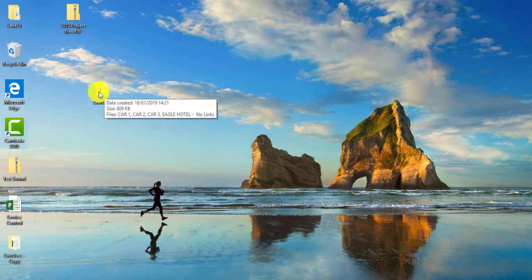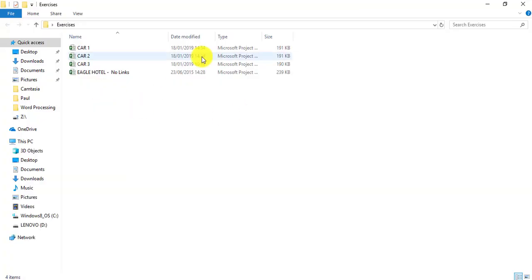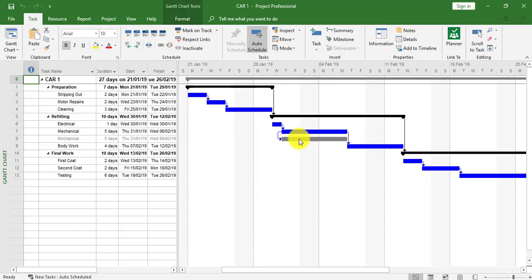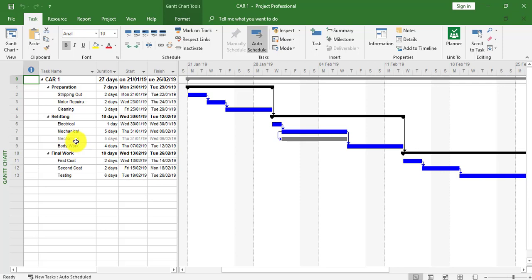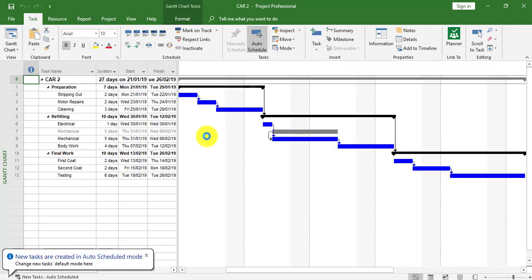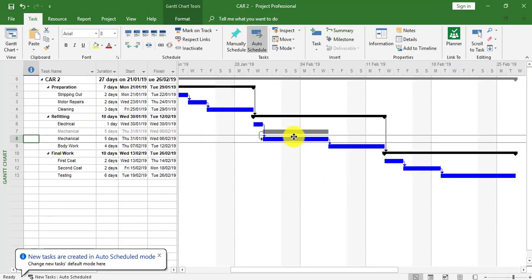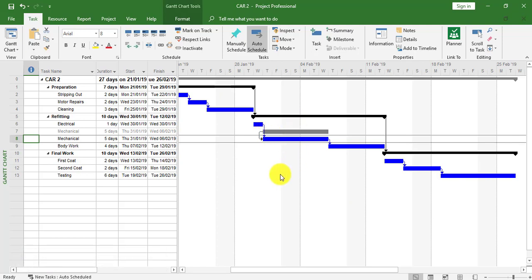We're now going to look at how these links affect the sub-projects themselves. Looking at Car One, we can see it has what's called an external task — a grayed-out task which is task eight, with a gray bar that defines an external task, indicating it's linked to another project. I can double-click this grayed-out task to see the link to Car Two, and in Car Two there's a grayed-out task linking back to Car One.